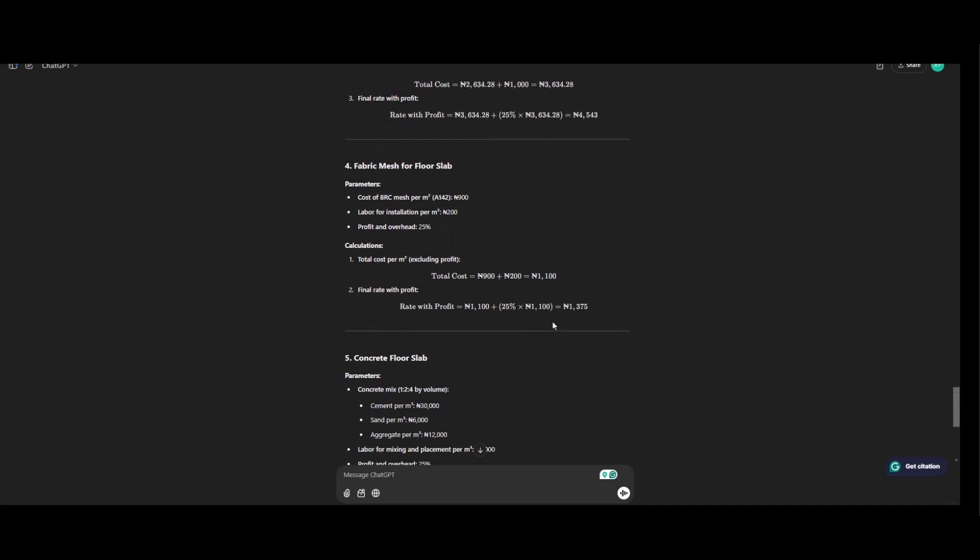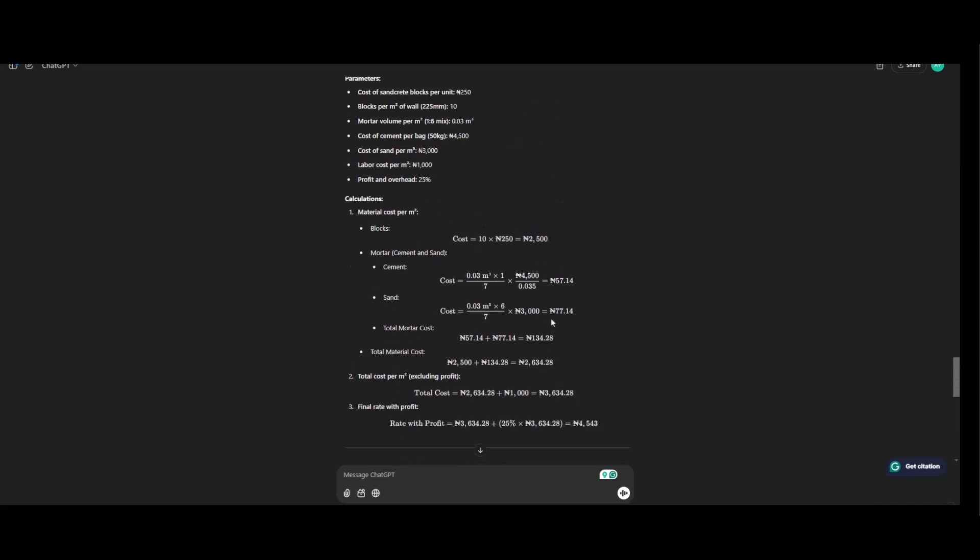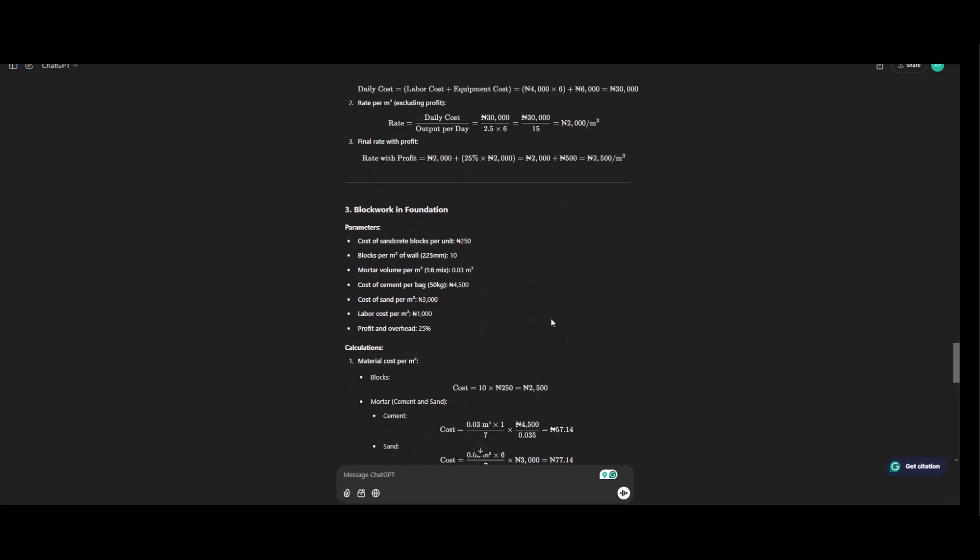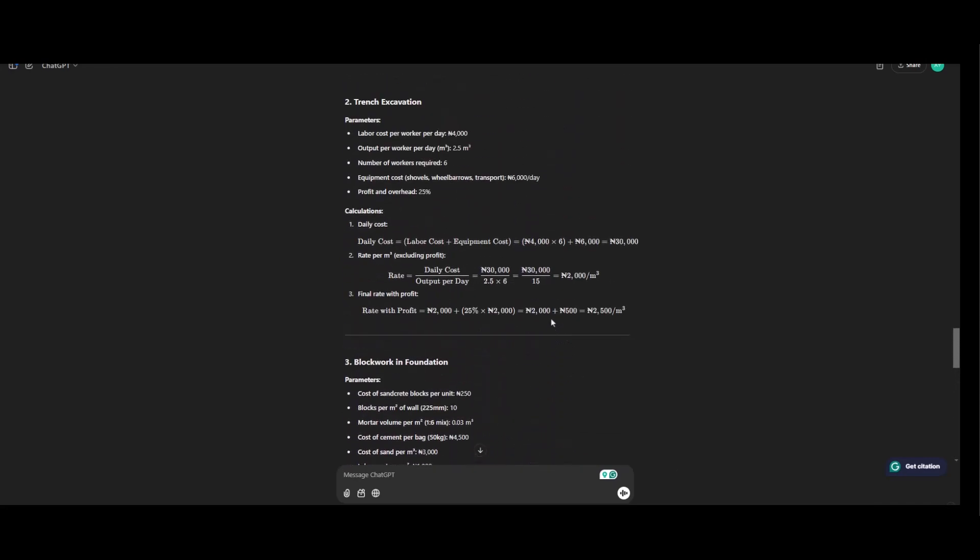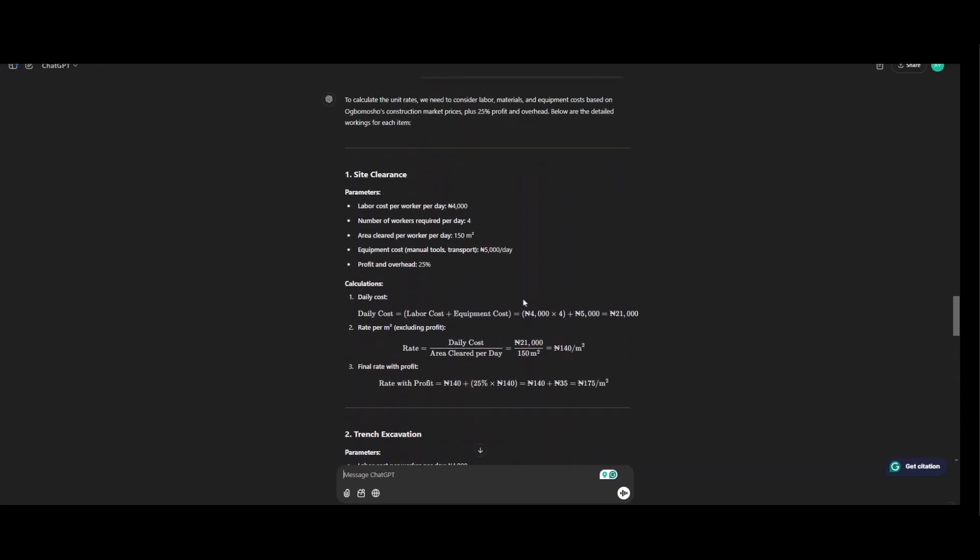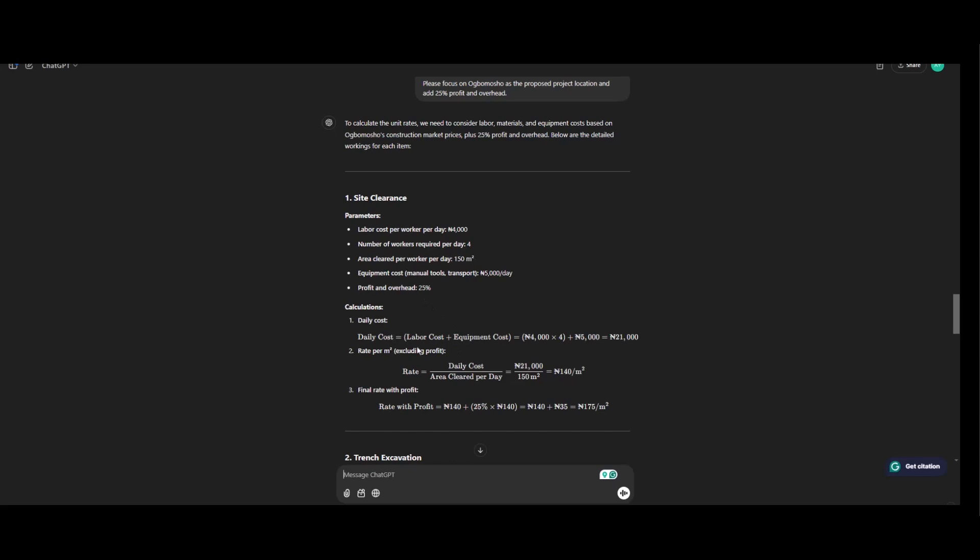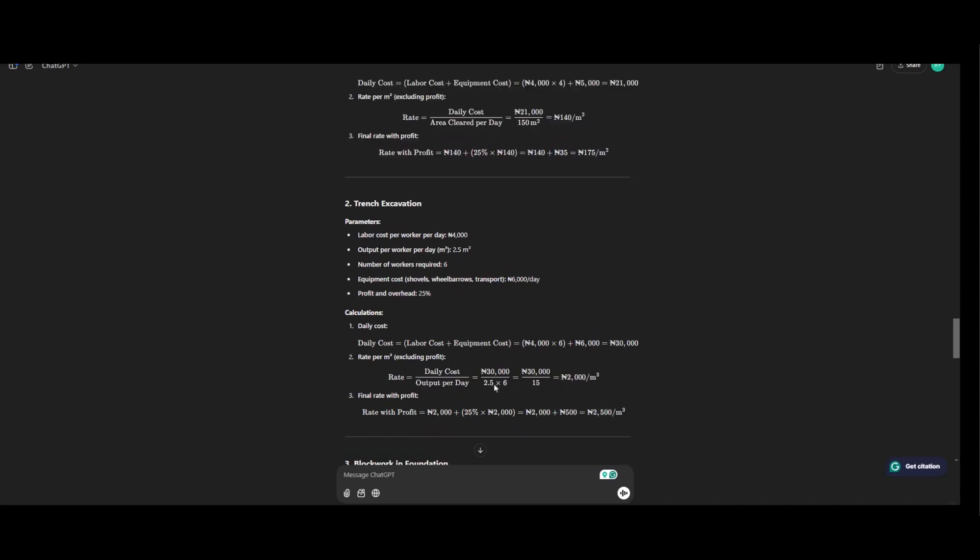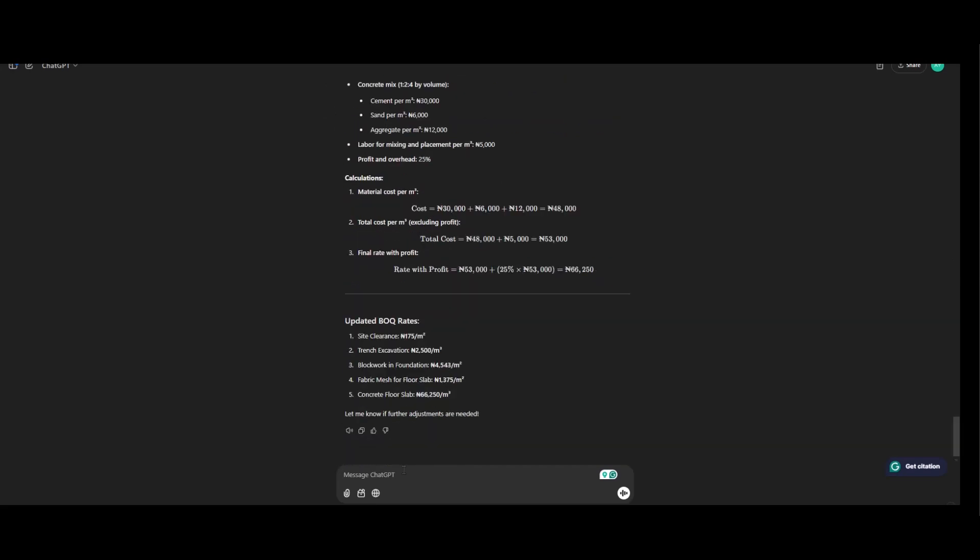Now you can see the difference between Lagos and Ubumosho. This is starting from this point and this is the calculation to which each of the unit rates is derived. So daily cost equals to labor cost plus equipment cost and rate per meter square excluding profit. So after this we are calculating a 25% profit and overhead. That's also the same thing for it.